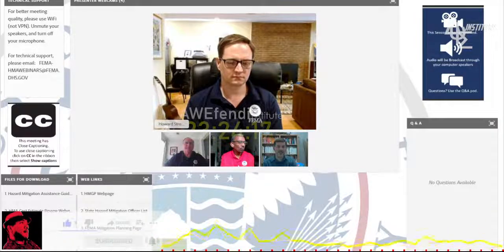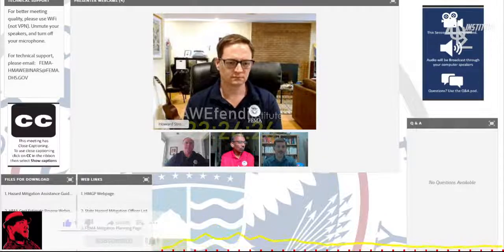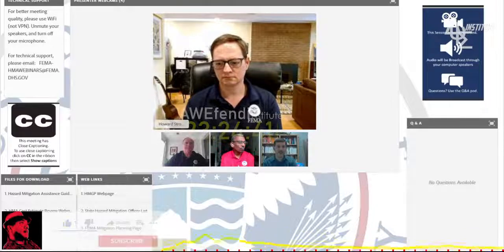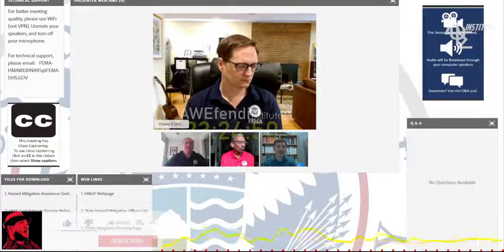An example, I want to go in and repaint my house. If it's 6 years old, I might be able to just do it. Whereas if I have to do it on a county courthouse, I have to account for whether it's more than 50 years old. Am I affecting something? Coordinate quickly. It's a process. It is not rigid requirements. But you do have to pay for that process, as Abdullah said. That will be a project cost, and you do have to include it in the examples of cost estimates that you might get from your local county or township.